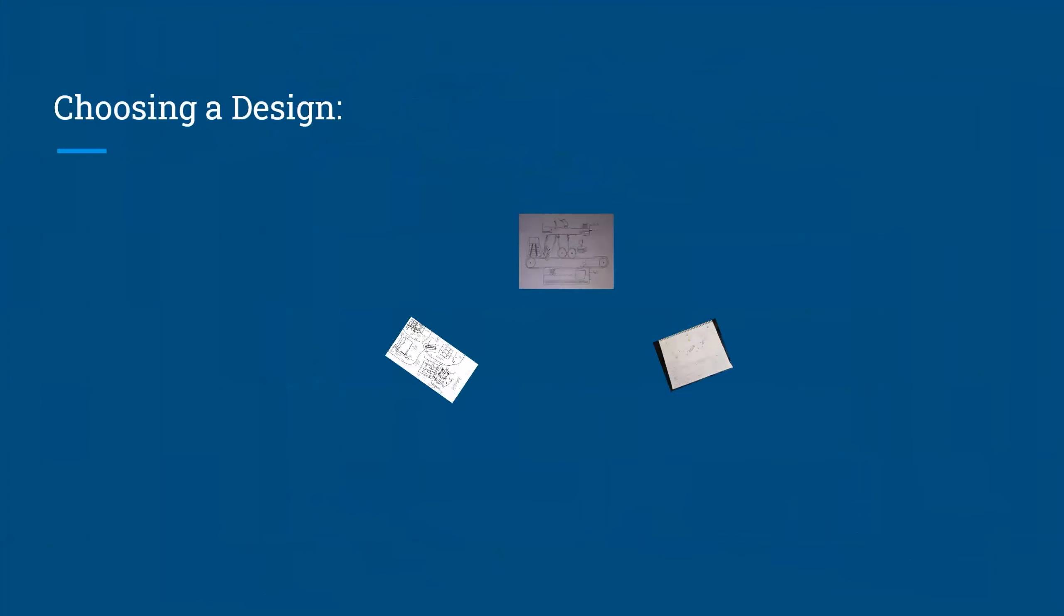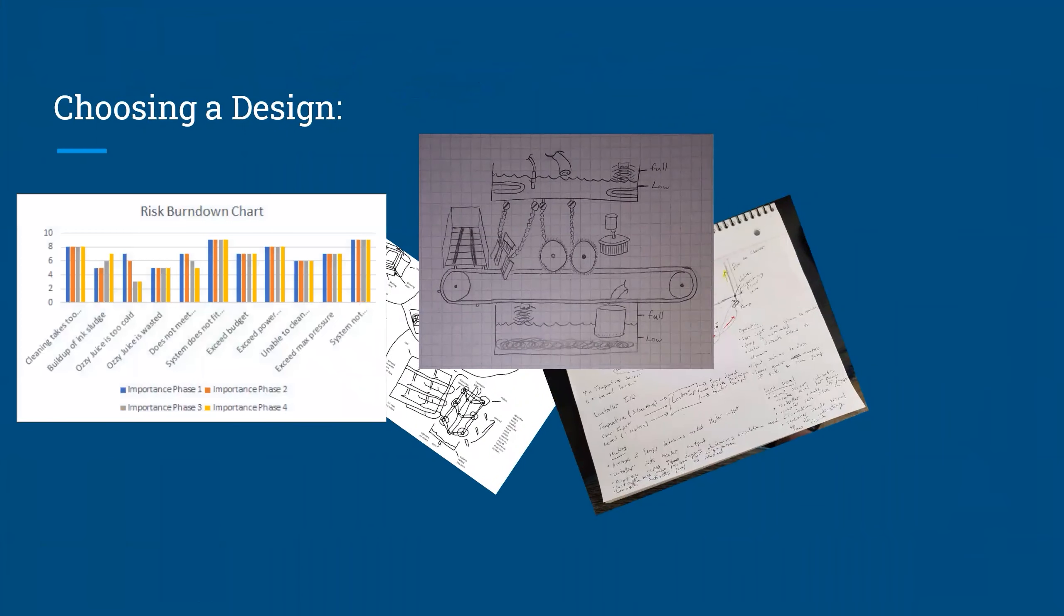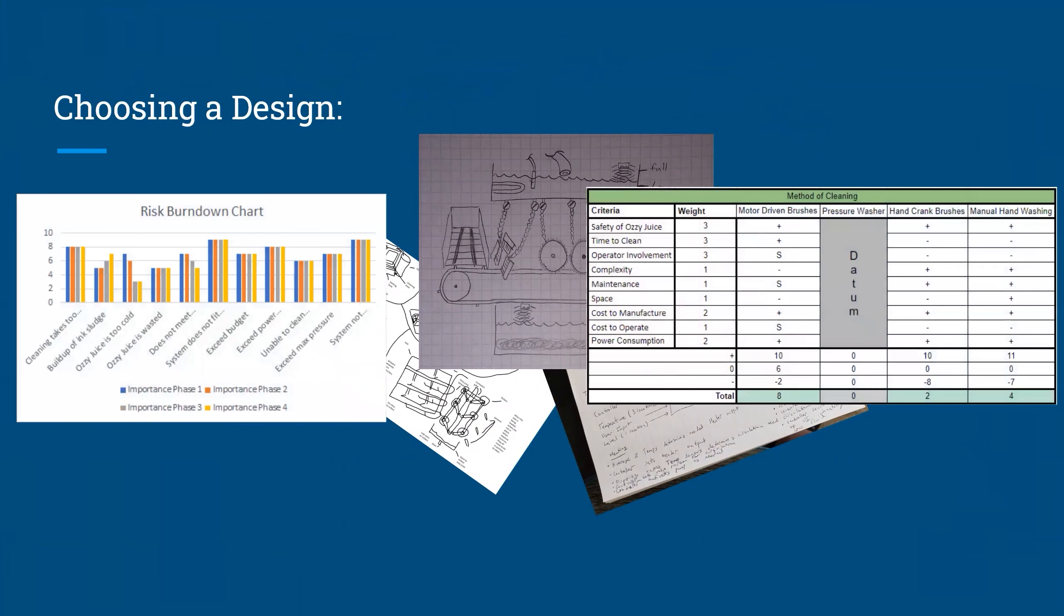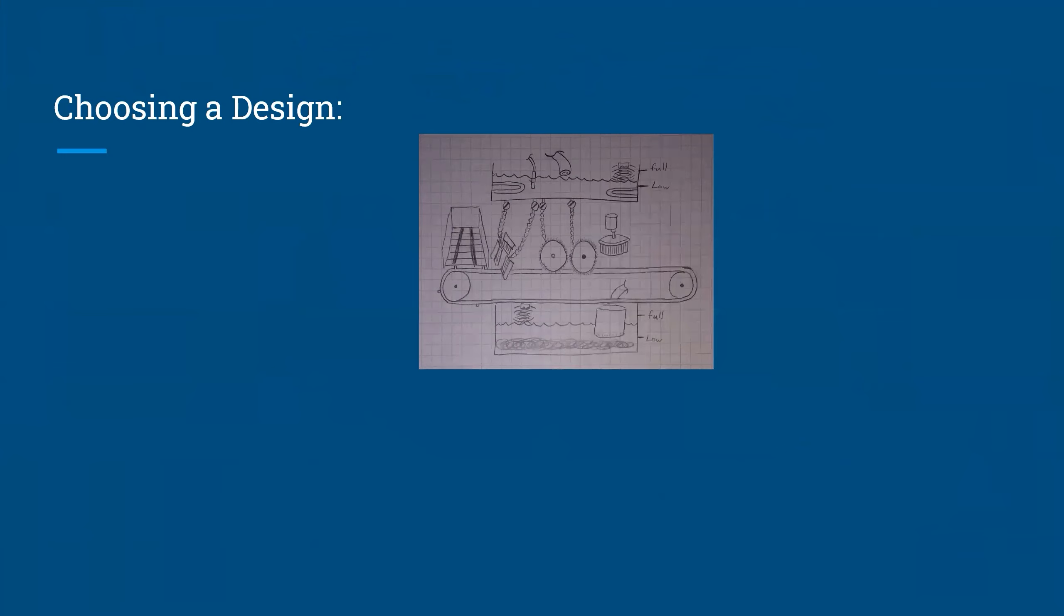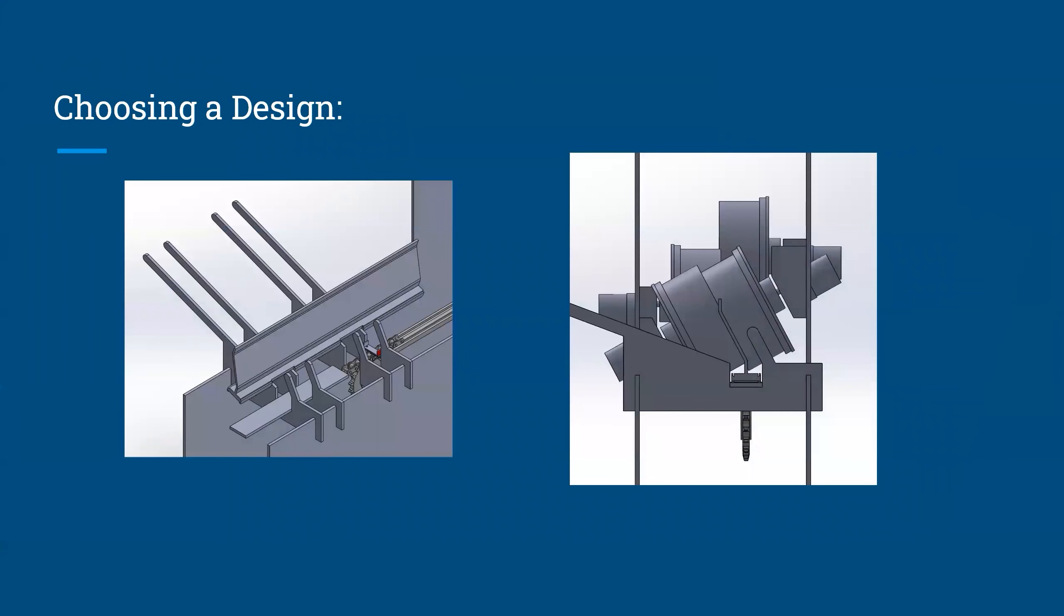We then looked at these three designs in more detail to try and understand the risks and opportunities of each. Picking the coolest shiniest system wouldn't help if it would be too expensive or too complicated to build. After some thought, we settled on the chain drive design. Our testing suggested that this would both fulfill our needs and be achievable with our budget. A hopper system would let a single user load the machine with multiple squeegees at once, and cleaning with rotary brushes would also clean faster than just by hand. We believe that this method would avoid complexity and minimize risk of failure.